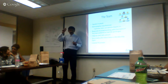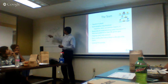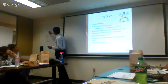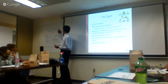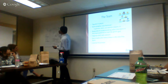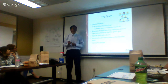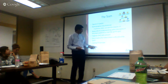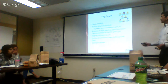So you pull the user stories from the product backlog during the sprint planning meeting. That story comes from here in the sprint planning meeting, and the project team develops the tasks during the sprint planning meeting. So together, user story plus tasks makes up a sprint backlog, and they apply the pull principle in developing the sprint backlog.